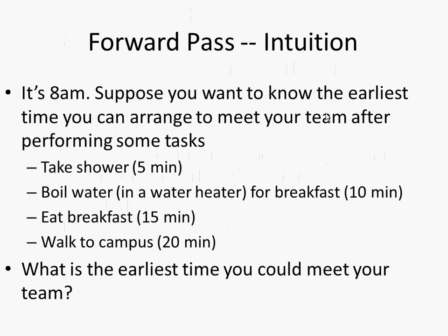Why don't you take a shower and boil the water at the same time? Maybe you can even eat breakfast while walking to campus, depending on what it is. Well, if it's in a bowl, it might be harder, but people have been known to do that. So if we can do some things in parallel, we could do it sooner. So suppose we can take a shower and boil water at the same time. Then what's the earliest time we can get to campus? 45 minutes, because these things overlap.